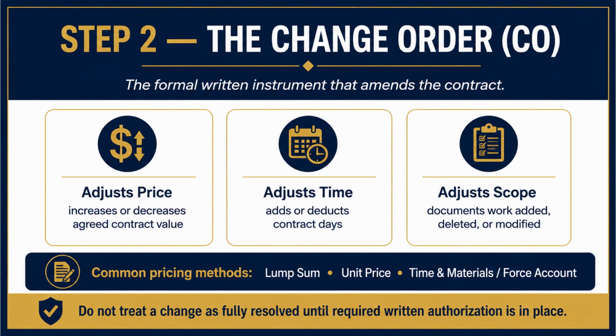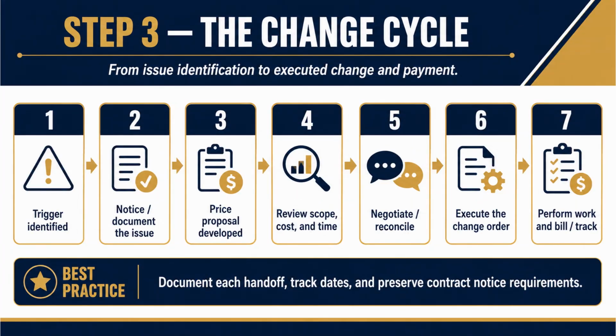And the rule under it all: do not treat a change as fully resolved until the required written authorization is in place. Same drumbeat: in writing, signed, before you rely on it. A change order discussed but not signed is not a change order. It's a conversation.